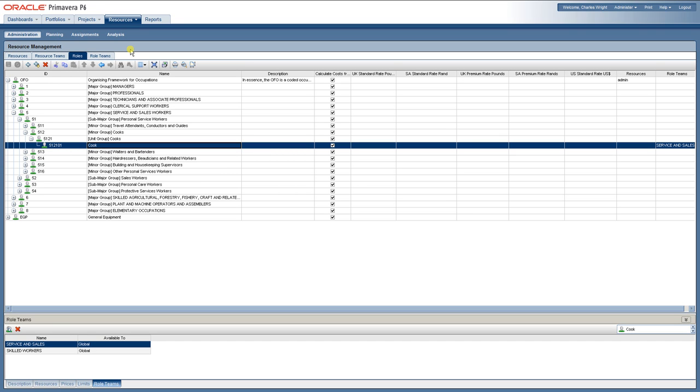When they mean a fully resourced schedule, what they're trying to actually say is that you've a fully role-loaded schedule. You need to prove that you, as a responsible planner, have planned this project in terms of time, in terms of cost, and effort. And you do the effort with roles. The planner then hands the project over to the project manager, and says, right, now go and staff those, go and find the resources to perform those roles. And that in P6 we call staffing, and there's actually dashboard pages and other pages in P6 that help the project managers select the right resources from the unstaffed allocations.